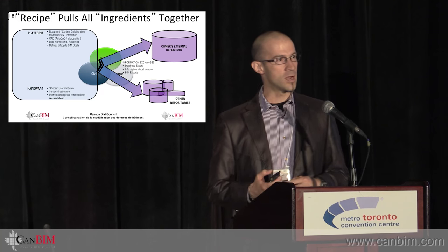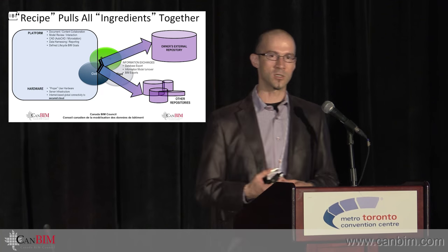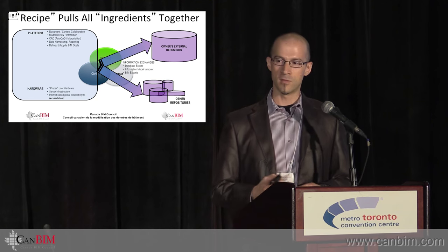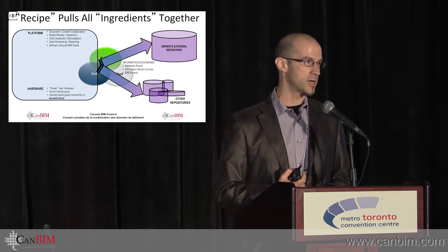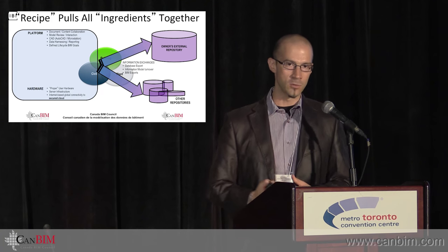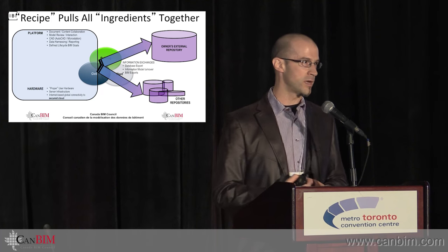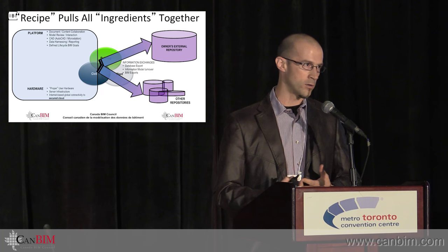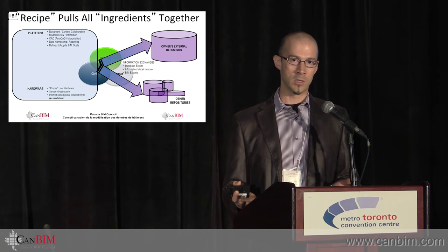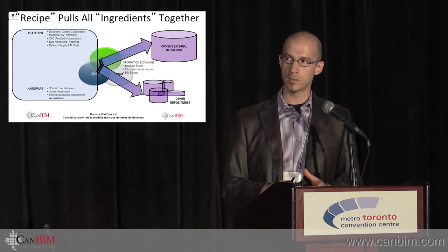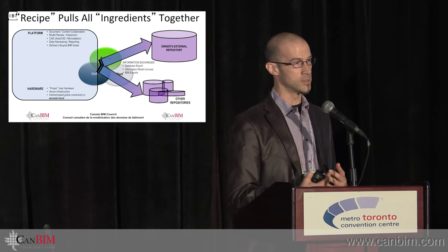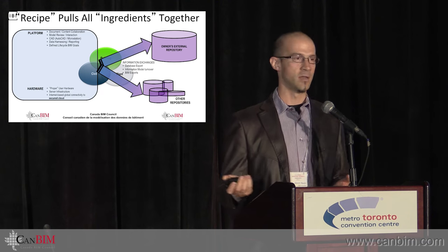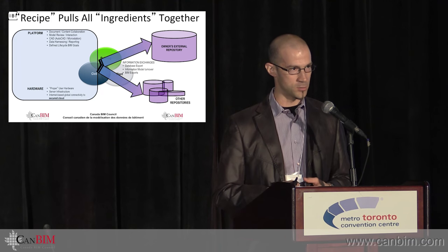So projects in the US, the DOTs, Departments of Transportation, have very specific requirements for civil data turnover. Most of them will have some type of a state plane GIS system set up. Maybe in a tool like Esri, they're going to want to pull in data from your civil model, whether it's Bentley's OpenRoads or AutoCAD Civil 3D. And they'll have a definition of what data they want. You've got to make sure that that data is queryable and able to be turned over to meet their needs. So how do you do that? And that's the BIM execution planning.